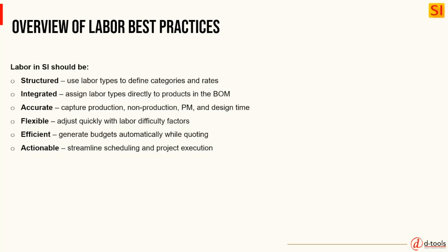First, labor needs to be structured. That's why we use labor types. Each type represents a category of work, whether it's installation, programming, commissioning, or some other type, and each can carry its own rate so that the budgeting is consistent.